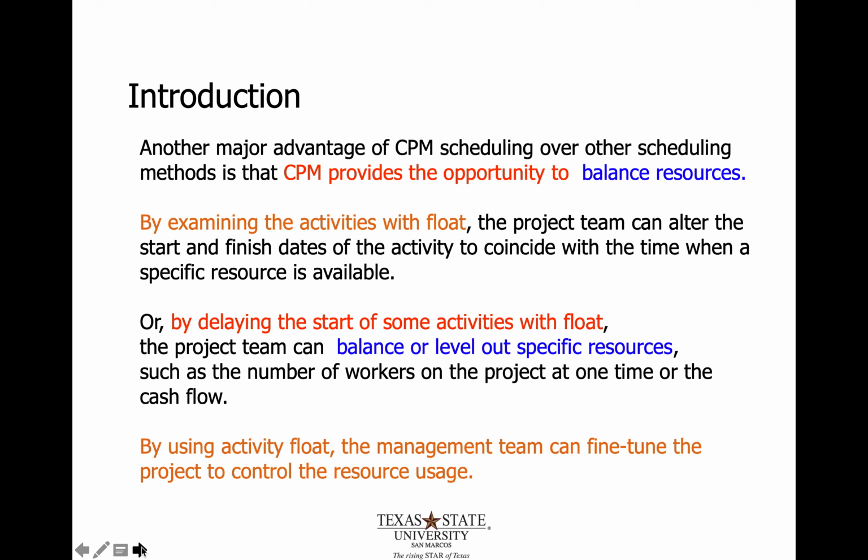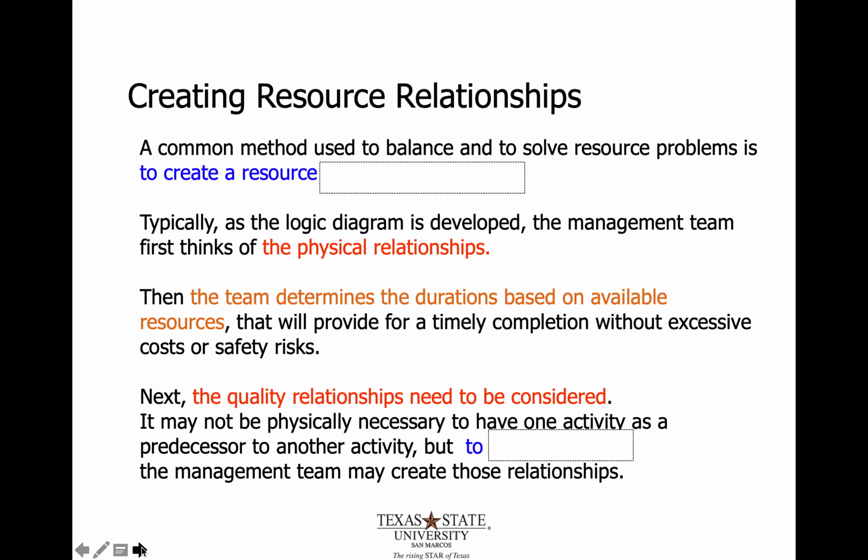And then the project team can be balanced to level out these specific resources such that you're not over consuming them. So generally, we'll see that the float in the schedule and understanding the types of float, the free float, the shared float, and independent float can be a bigger tool than the schedule itself when you're actually forecasting things that you have at your disposal.